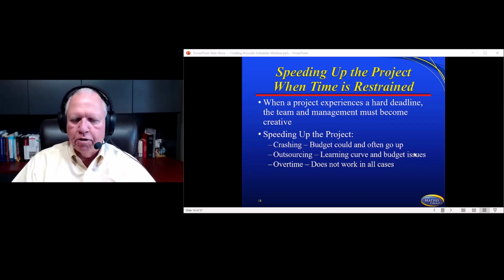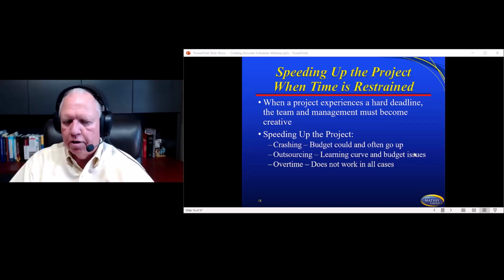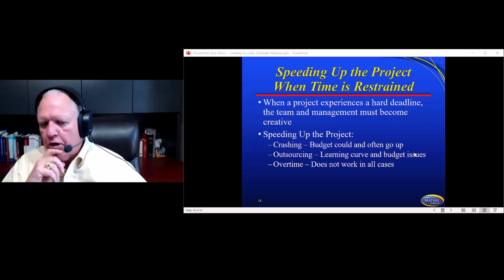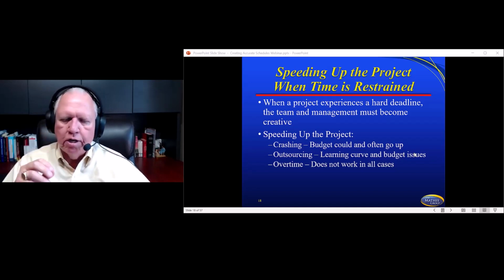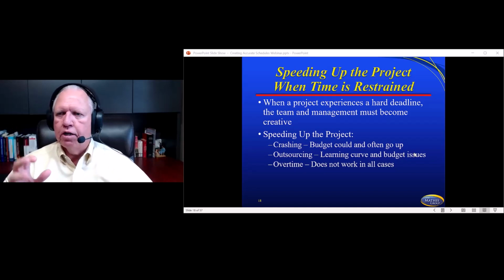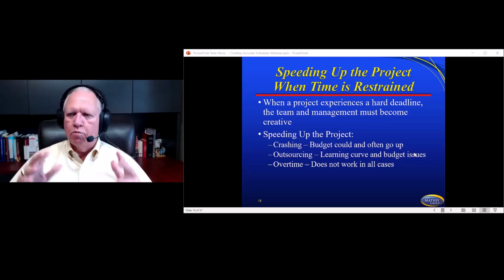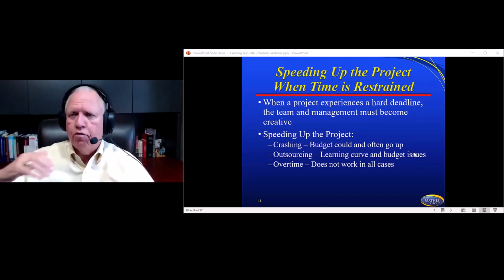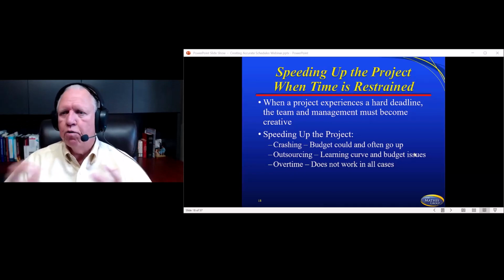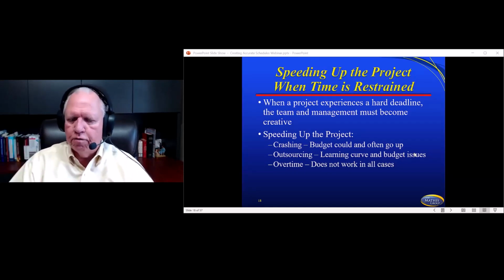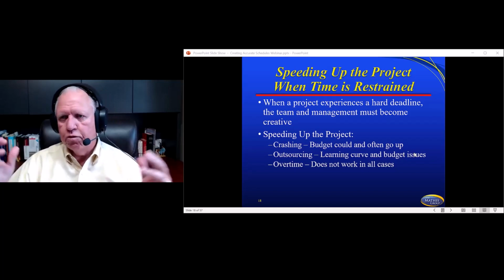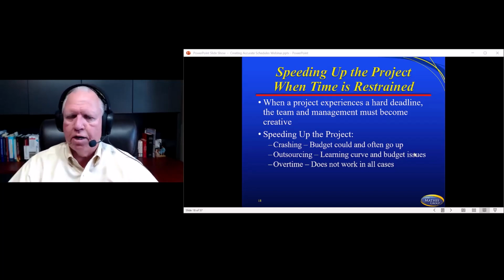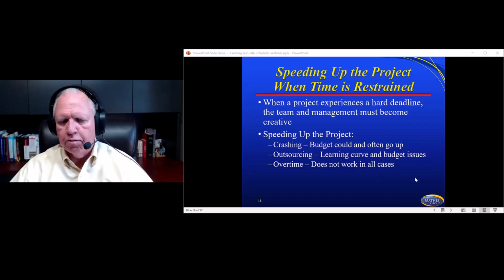So when a project experiences a hard deadline, the team and management must become creative. And you've all done this. For example, crashing the project. And so the budget could and often goes up when we try to crash the project. As you know, crashing is defined as throwing more resources at something. And we do that. We throw more resources at it. And so what happens? There's no free resources, so it costs us more. Outsourcing. Well, we hire a vendor, but there's a learning curve with your vendor. And then also overtime. So we're trying to get people to work later. And of course, overtime is not even available in some of these cases for some of these folks.